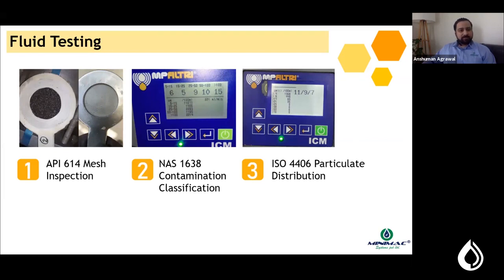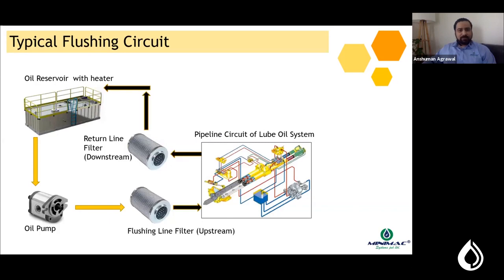The fifth cornerstone is fluid testing, with three major parameters. First is API 614 mesh inspection: a mesh screen is inserted into the return line downstream of the pipeline being flushed to collect and analyze any dust or debris. Once mesh inspection is cleared — the primary inspection — you proceed to the secondary inspections: NAS 1638 and ISO 4406. Most industry standards reference all three inspection parameters.